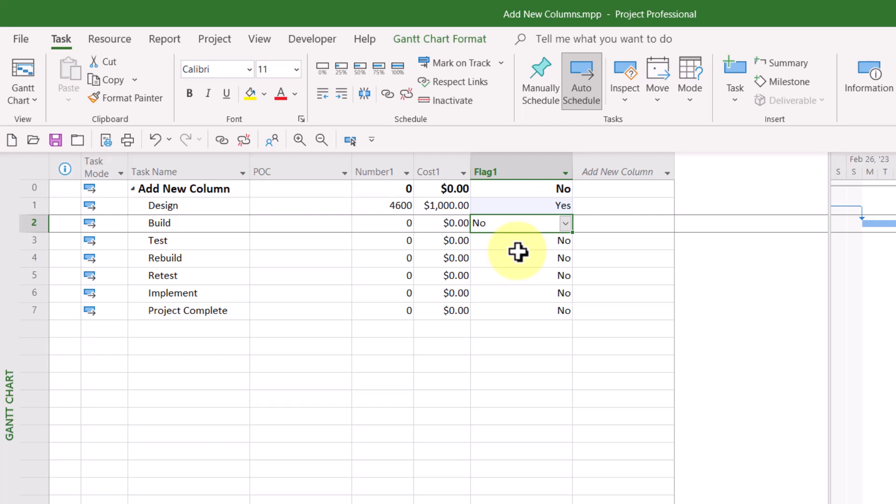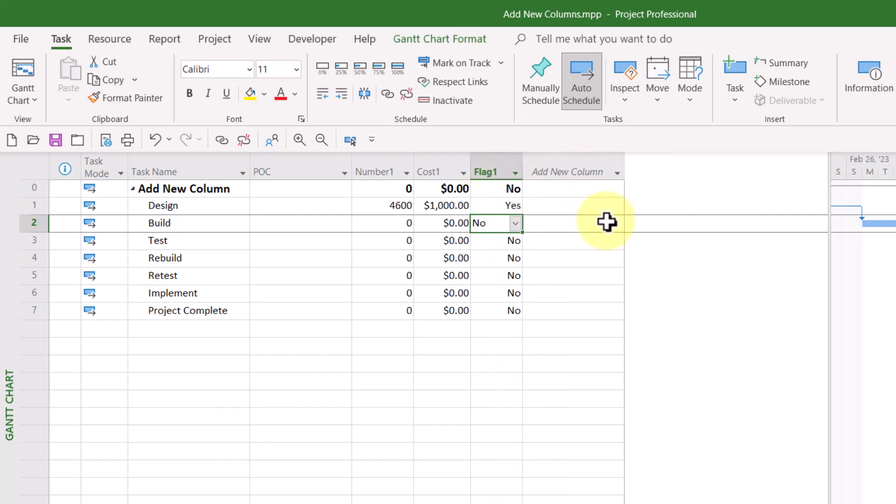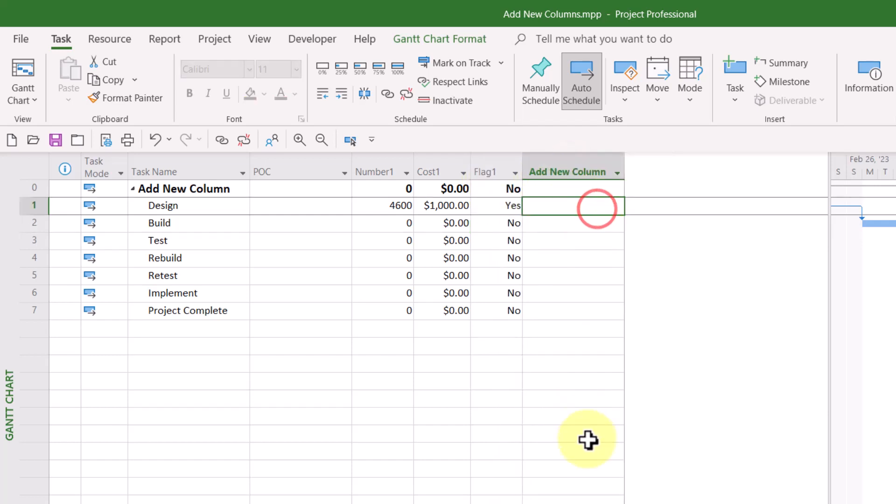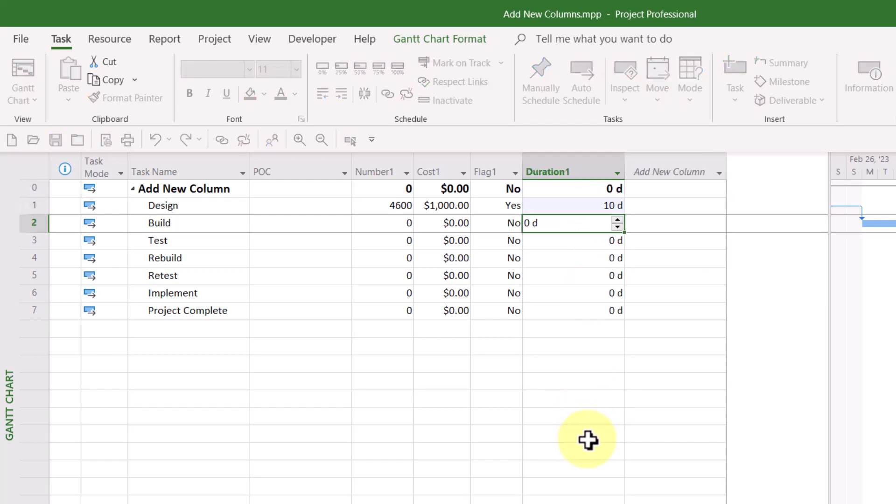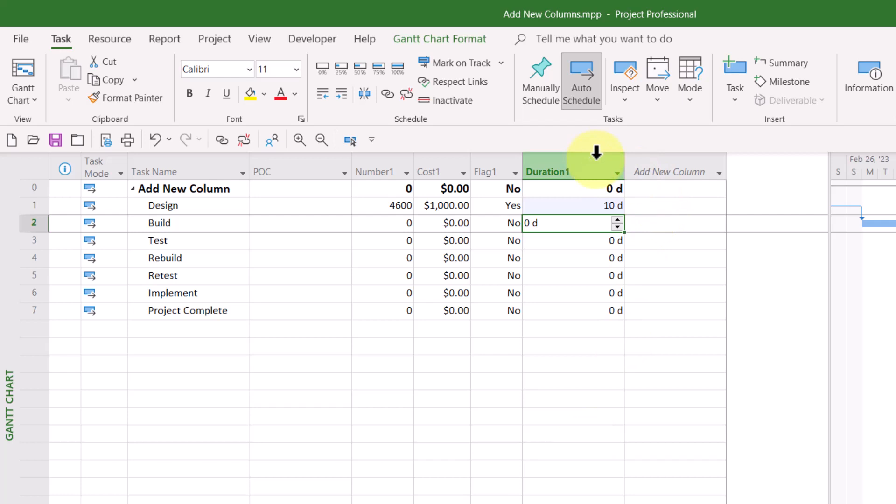And if you type a duration value, such as 10 days for a task in the Add New Column Virtual Column, you probably anticipated that Microsoft Project would automatically insert the first available duration field, which in my case would be Duration 1.